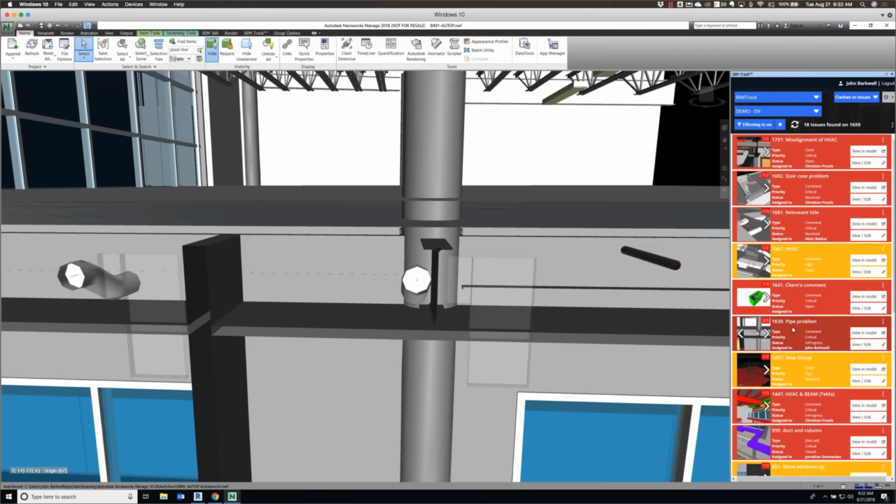So you can have multiple views related to one particular issue in one card, if you will, inside of BIM Track. The classic example I always think of is the cable tray, right? You run a clash detection report inside of Navisworks, and that cable tray may pick up like 30 plus clashes within that one room. But you know, and I know, that that's really one clash, because if we move the cable tray down half an inch, let's say, it may resolve all of those clashes. So we don't want to have 30 of these cards over here inside of BIM Track. We want to have one.